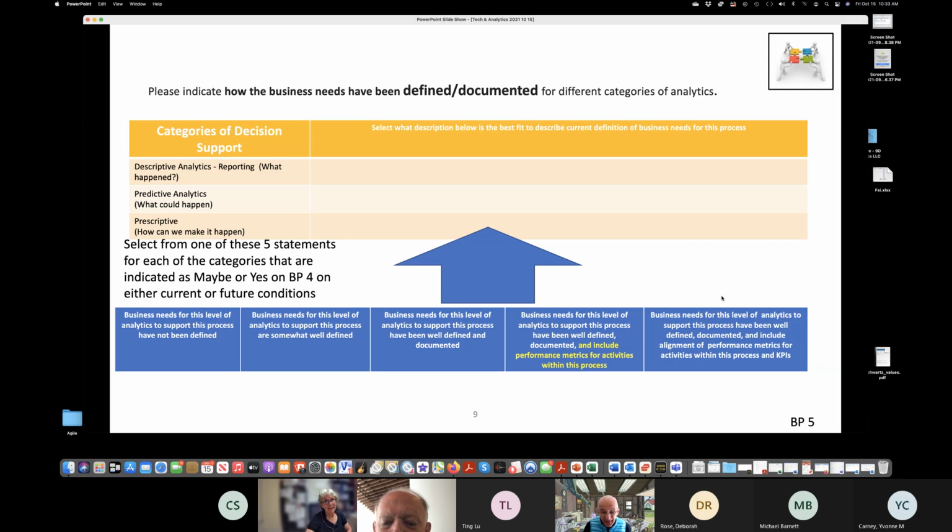Yeah. A couple of years ago, we were working on a project at the water district, and we had a 4 months delay on the project because we had to go through a procedure to get consultants access to our network. So I asked one of my engineers to just map out what it takes and who is involved, and it was unbelievable. It barely fit on an 11 by 17.